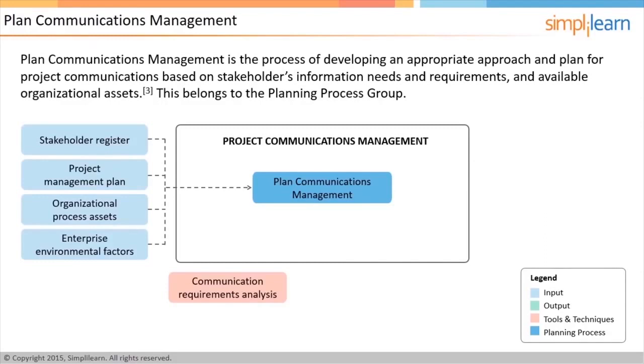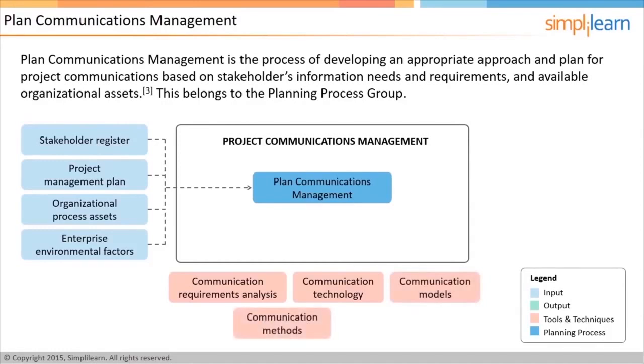Next, you can decide on the communication technology. These days, email is the most widely used technology, but in a few cases, you might have to send information using some other technology, like fax or registered post. For example, all government communications are done using registered post to keep a written record. Finally, you need to understand how communication really happens. That is, the communication models and the various communication methods used.